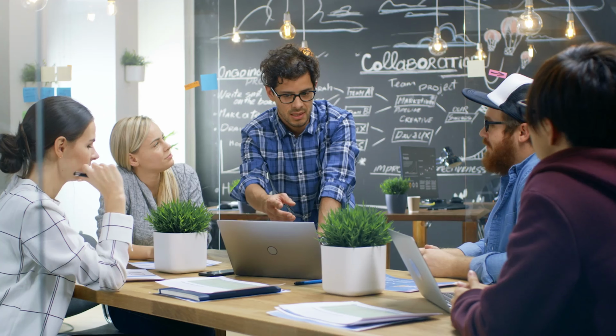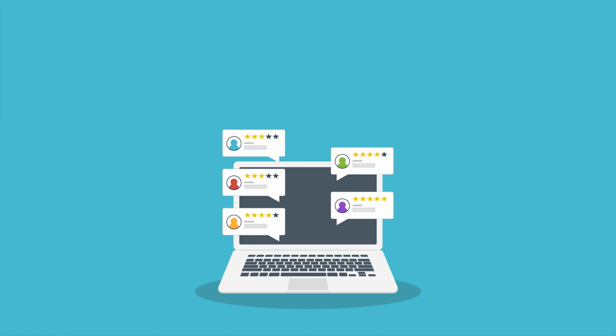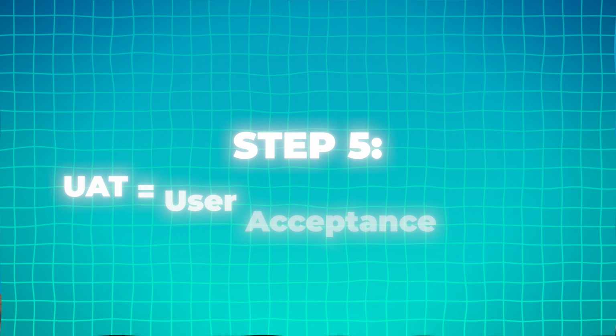Once we get through design and development and having that constant feedback loop with the client and the engineering team, then we move into a phase called quality assurance and testing, where automated tests for the application will be written or tested to make sure that security, important functionality is working, etc. before we deploy live. Once we get through that quality assurance step, then we're moving on to something called UAT, which is user acceptance testing, where you, the stakeholder, and with any end users that you want to test your application with, you'd send them to a staging environment where they can test and give feedback.